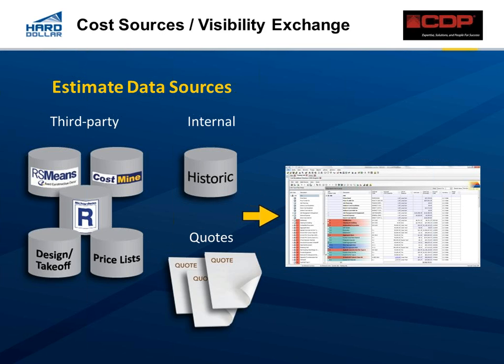So financial systems typically are going to approach forecasting from a purely arithmetic standpoint, which is frustrating often. You get into scenarios where, well, we're 50% done with a scope item, and we've lost $100,000 compared to budget. So, well, we're going to lose $200,000 by the time we're totally done with it. So the systems will sort of interpolate where you're going to end up.